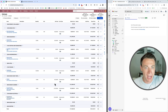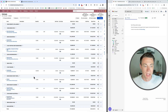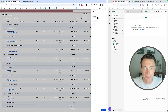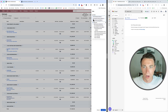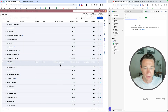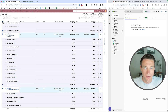It doesn't need to be one bid package for each item — you would pretty much do this by trade. For example, I could grab all the plumbing, grab all the electrical, et cetera. I'm going to create a bid package for electrical. What I like to do is create these from the estimate, not from a template, because the estimate helps indicate whether it's relevant or not. So I'm going to filter my estimate right now on cost code, just start typing 'electric' and select all. I've got rough electrical and finished electrical showing up — I'm going to get one bid for both of those items from my contractors.